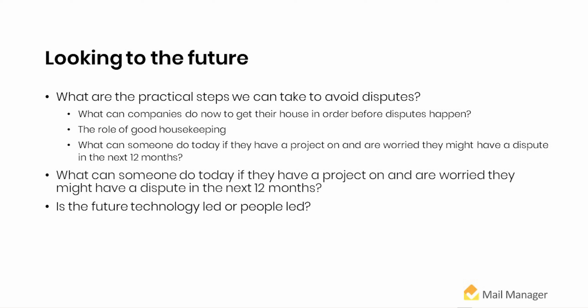It's not just about the documents, it's about the information in them. So if you have a change order that inadvertently leaves the issue of an extension of the schedule blank because somebody doesn't know that they have to fill that out or doesn't know what the contract says, you've got a problem. You've got a problem for your later delay claim, either for your company or against your company.